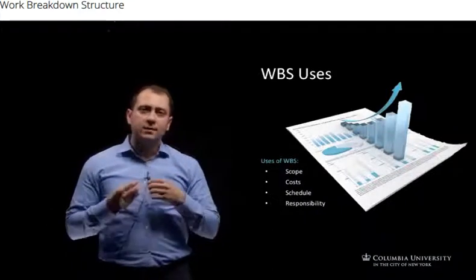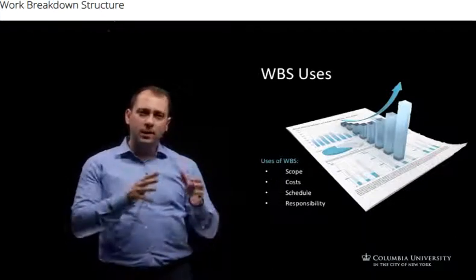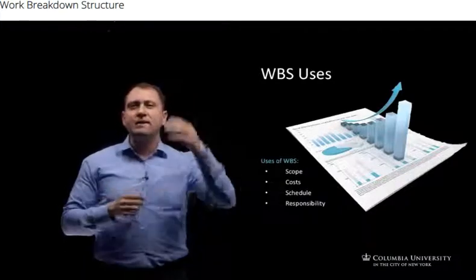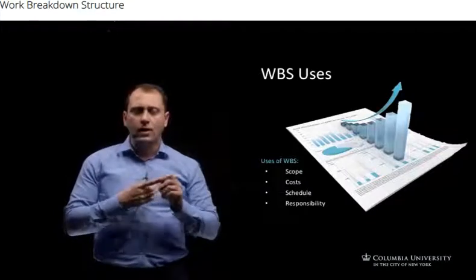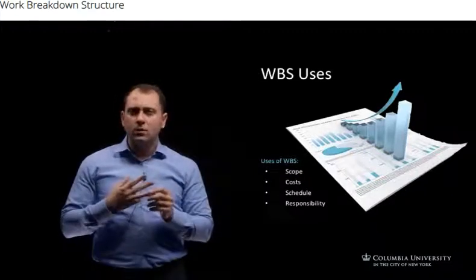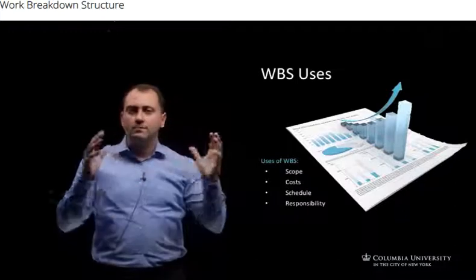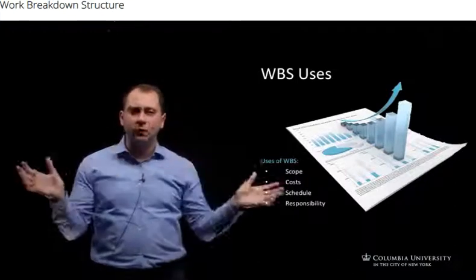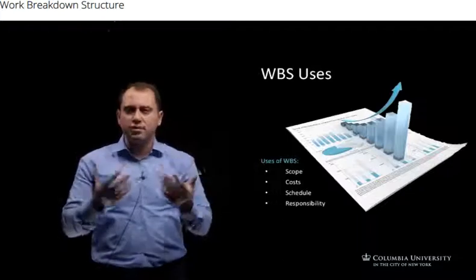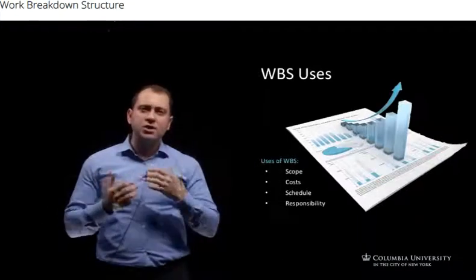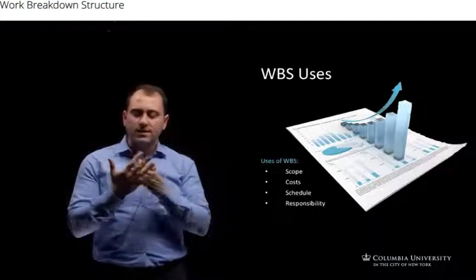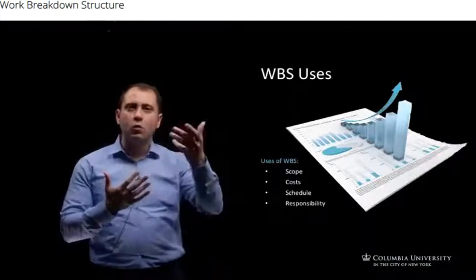The construction activities associated with delivering the work package of the north wall would be something similar to assembling the steel or rebar of the wall, putting the frame or forms around the rebar, pouring the concrete for the wall, waiting for the concrete to harden, and then taking the forms out. Then we have the work package of the north wall delivered. It's measurable, it's deliverable. What I just mentioned, these five activities, are called construction tasks or activities. These will be used to deliver the work package.